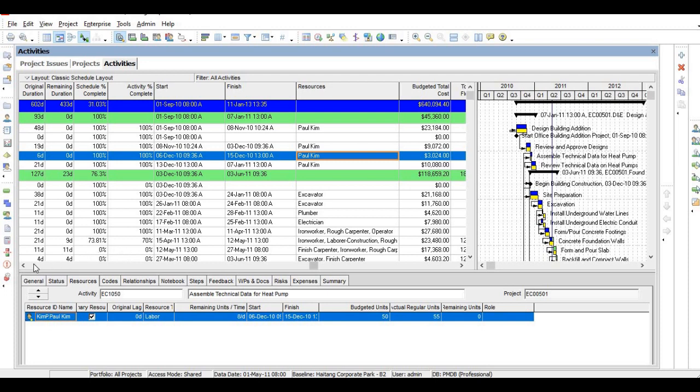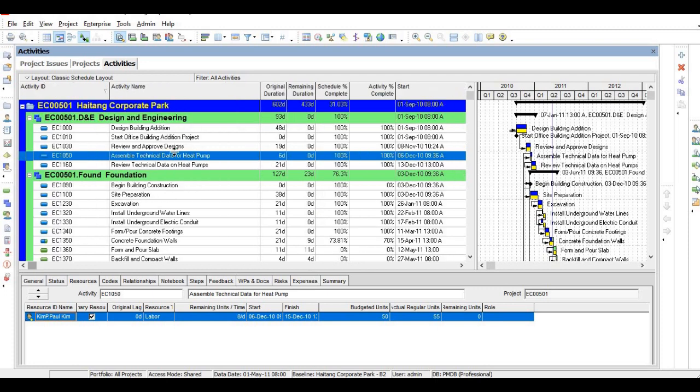So Primavera is mainly used for planning. Planning means entering activities and giving duration. Then scheduling. Scheduling means arranging activities in a sequence. We have to arrange activities based on logic. Logic means what?